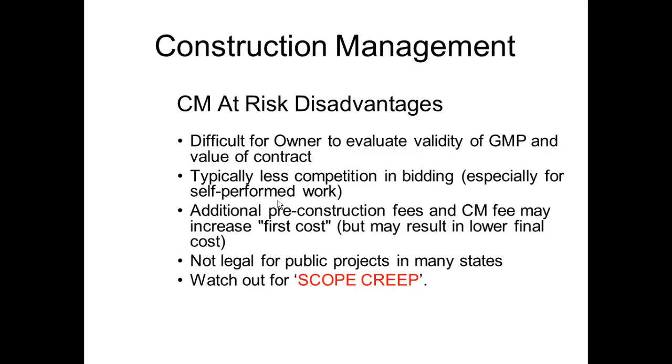This is especially true for a renovation project. If you run into things that are unknown, those things could be lead paint, they could be asbestos, they could be PCBs, anything that has a regulatory look to it or becomes an issue after the fact can cause some issues with the GMP. But if everything is pretty straightforward, you can expect that the GMP will stand up, and there should be very little in terms of change orders during the project construction.